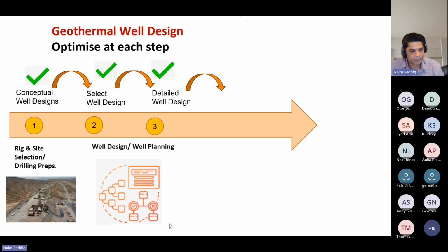For example, later on you find out we may be drilling more footage because the reservoir could be 200 meters deeper. Are you going to go back to the select phase again? Probably not. You may strengthen your design, modify things. If your rig cannot handle this extra footage, maybe you need to change the rig to make it happen. The most important factor is to deliver the well according to the specification.